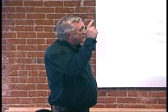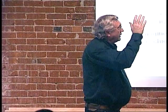The general contractor told me one time, he said, controls are 1% of my construction cost, and they're 80% of my headaches. And I think about 1% of my construction cost. If one control contractor is 25% higher than another control contractor, got any math wizards out there? I think it's 25 ten-thousandths of the cost of the construction.